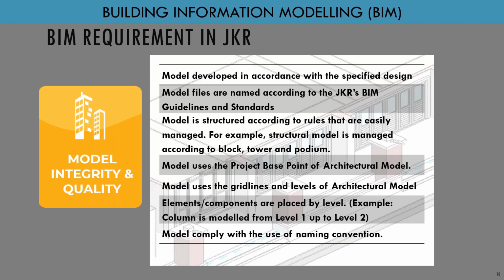Such as if you have a commercial building, you have a tower, and then below that you have a podium, parking, you can separate it. So that you can easily manage the models, and all the others will understand how the structure model is being developed. When we combine it and do the coordination, it can run smoothly.